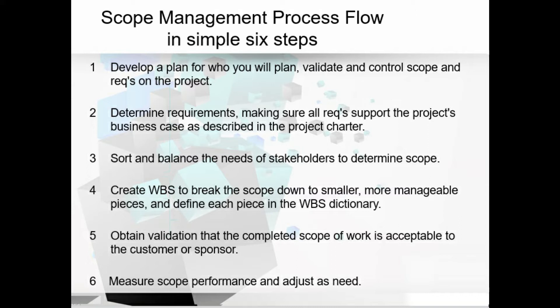In the real world, the requirements team and the scope work are different. You must be able to say NO when someone tries to add unnecessary scope to your project, as it adds time, cost, and risk. Any unnecessary scope falls under a separate project and needs to go through the project approval process.